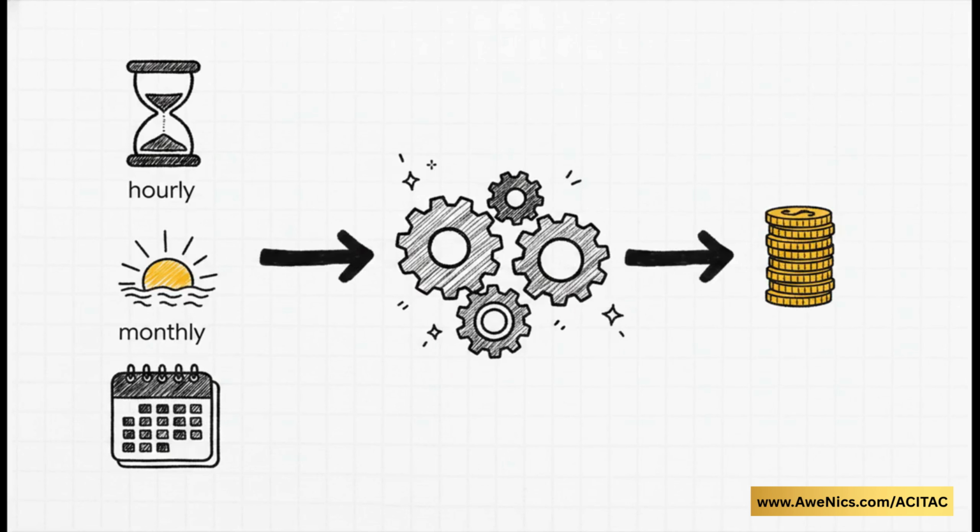And entering these rates is incredibly flexible. By default, MS Project assumes you're typing in an hourly rate. But if you pay your laborers $500 a day, you literally just type 500/D. If you have a site supervisor on a monthly salary of, say, $35,000, you just type 35,000/Mo. The software then looks at your project calendar, maybe that's 26 working days a month, and does the math instantly to divide that monthly salary into a daily cost for whichever tasks that supervisor is assigned to. It is so powerful and saves you a ton of manual calculation.